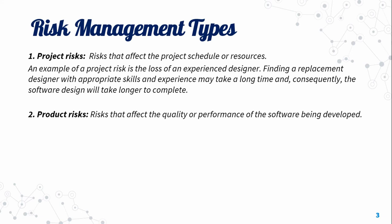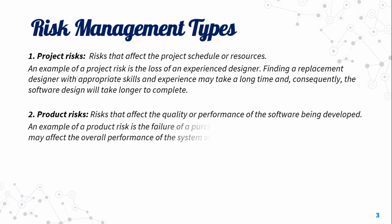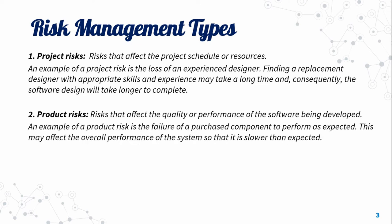Product risk refers to risks that affect the quality or performance of the software being developed. An example of a product risk is the failure of a purchased component to perform as expected. This may affect the overall performance of the system so that it is slower than expected. That means the process is slower, so we have product risk.